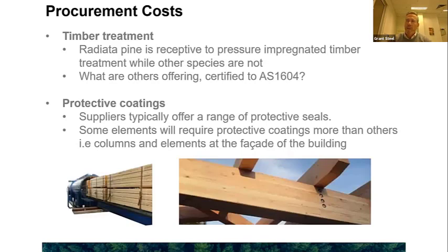Timber treatment being another additional cost. So radiata pine is a molecular structure which is receptive to pressure impregnation of treatment. However, there are many other species which will not be. So it's best to check what others are offering in terms of the H3 class treatment, because they may not well be certified to the local standards, certainly not to ES 1604.